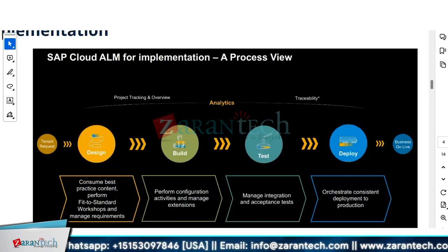So in 90% of scenarios, you will be working with SAP Cloud, the hyperscalers, and different teams. All of this you have to take into consideration, even if you are not responsible. You have to say, this is going to take some time, so we have to plan like this. Or this piece is going to take not 7 days, but probably 3 weeks, because of these pieces, right? For security, we have to request the hyperscaler or Rise with SAP. Again, SAP also comes into the picture, where you don't have much access, you just create requests. So every piece you have to take into consideration.